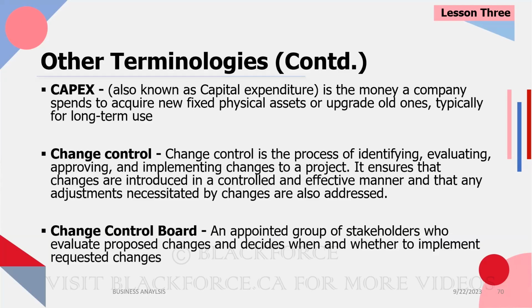So what would you do? You tell them, oh, absolutely, I'd like to be able to communicate your request to the right parties. Can you put it in writing, please? Right? So they put it in writing, and then you need to understand what the change control process for your company is. Your company may require that for a change like that, the person requesting needs to document it, and then the project team would submit it to the change control board.